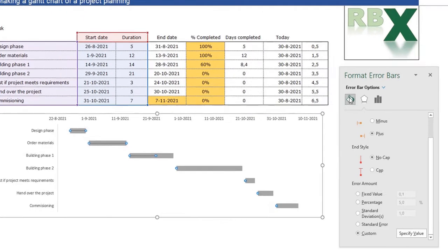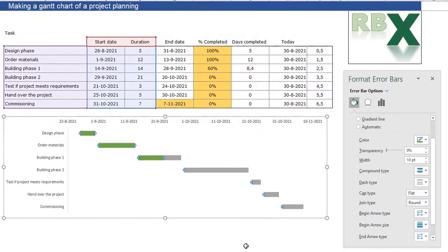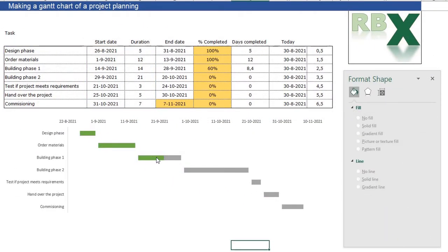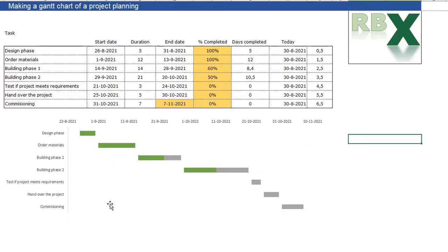The error bar now shows the percentage complete. We go to Fill and Line on the error bar, change the color to green, and increase the width to about 10 points. Now there is a green bar showing the percentage complete for each task. To verify, I change a value to 50% and you can see the green bar updates — the fourth task is now green for 50%.